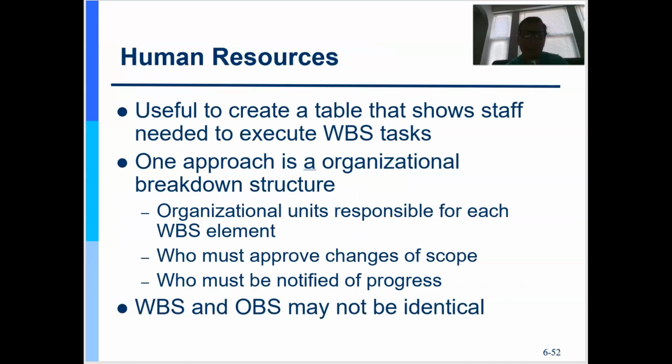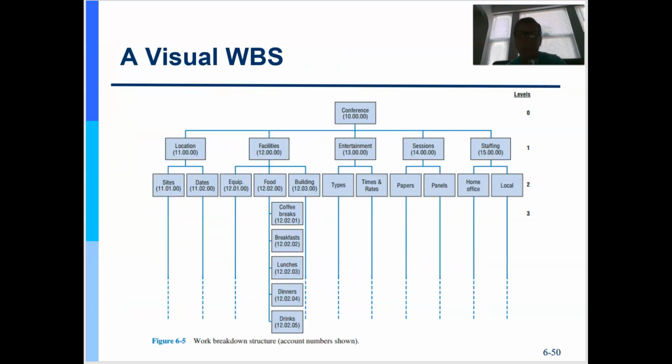Now, with the work breakdown structure is also going to come, so the work breakdown structure looks like an org chart, right? It doesn't have a lot of information. I am going to include with it a document called a work breakdown structure dictionary. In the dictionary are going to be all the details in these little boxes. Who's in charge, when it's due by, what the quality standards are, etc., etc.